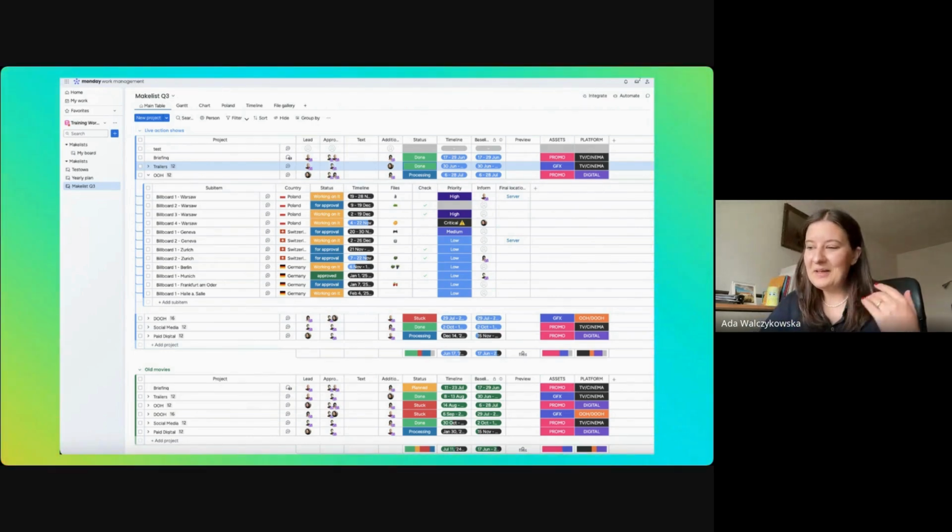So you suddenly have a situation where you have to think about how to build this document in a way that is clear for everyone and easy to use for people who maybe are joining this project for this client only once, and they have to immediately be able to read it. So you have to make some decisions. And long story short, if the project is relatively small, maybe it's complicated, but it's maybe up to, I don't know, 100 assets, then you might want to keep everything on the item level.